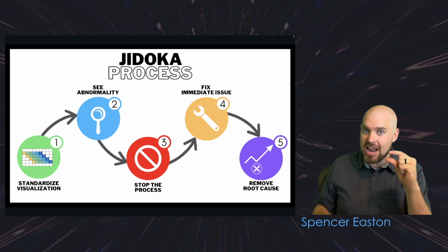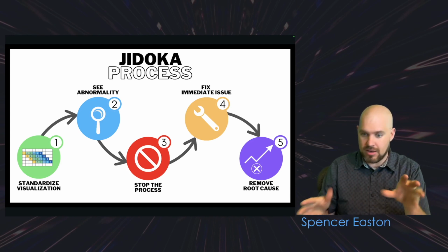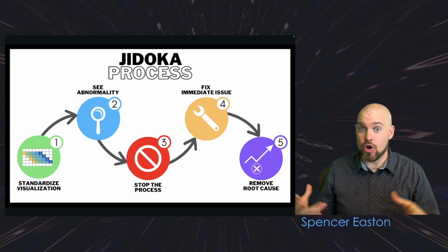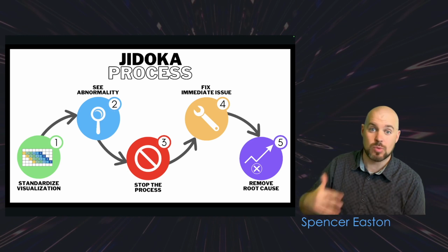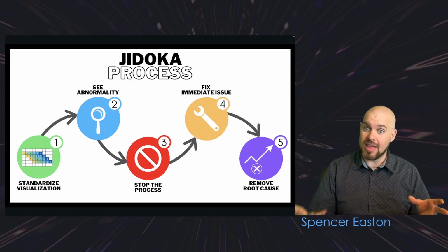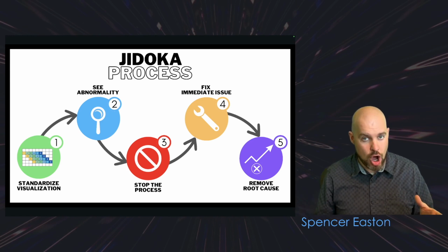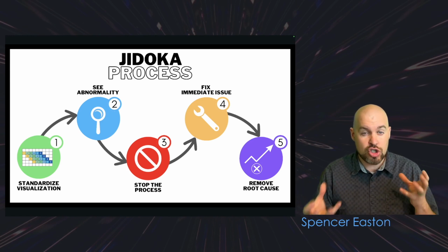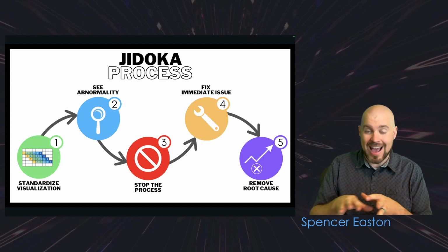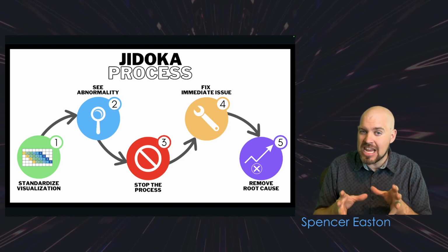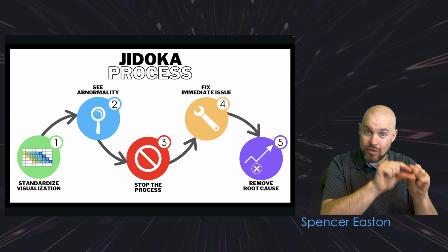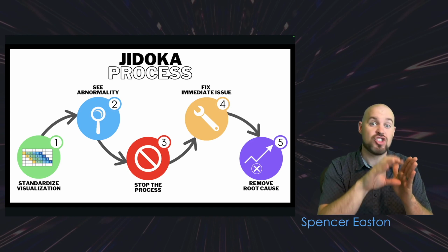So now that we have that standard visualization of, okay, this is the paint, it's the same in every single area, whether you have a lot of it or not. Let's say that you have glass walls all in one room, and then in the next room, it's all painted walls. Well, from that room to that room, is the work amount equal? No. But are those two areas Takt zones? Maybe, maybe not. And if they're not, the idea with Takt zones is getting your areas equal by amount of scope. So that's a standard that whenever you're doing paint, it's a set of processes to follow.